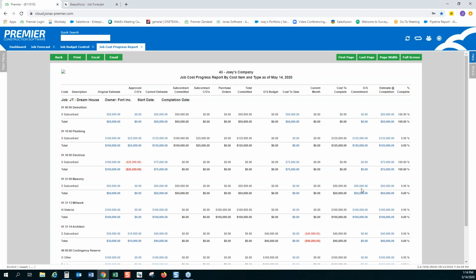But on the other hand, what happens when you go over budget, right? Well, when your actual costs exceed your budget, that is where the automated formula kicks into play. So if our costs were, for example, $60,000 and we only budgeted for $50,000, well, obviously we've already spent $60,000, and so the system is going to use that higher number of the actuals as your estimate at completion or your forecast, because you've already spent that much, right? So as you can see, that's how that automatic formula works, by taking the higher of the two.